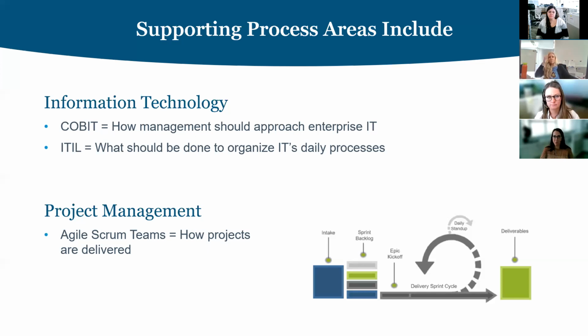For IT, we have a lot of incidents come up that they might need to jump in and help with. So we just have some stories that cross the board to account for our resources and allocate time that way. But we don't split people between different teams or multiple teams. It really is best when they're focused on this being their team. They know who their product owner is and their Scrum Master.